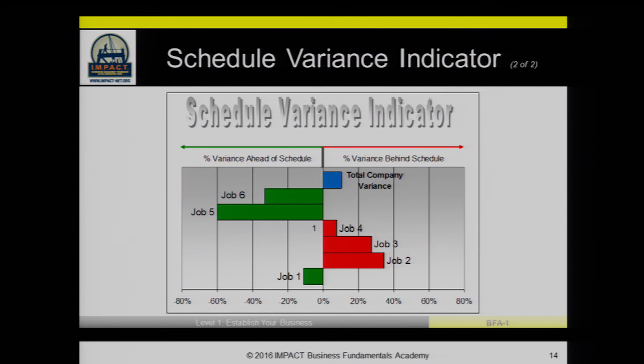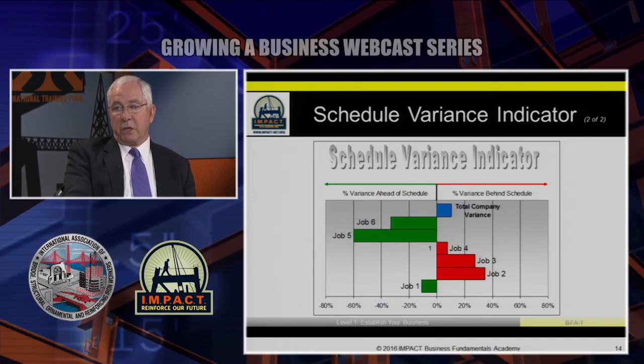And so that would result in a positive 33% variance. Conversely, if you had 120 days, original project duration, minus 110 days, which is the revised project duration, it's actually shortened, and divide by the total remaining project, which would be 60 days, that's a 16.7% negative variance. But then this is computed job by job, and you can see how projects are performing according to the actual schedules that have been prepared for these projects.